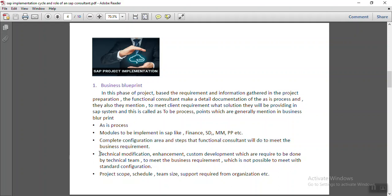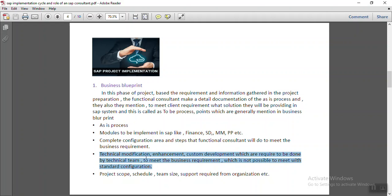The business blueprint also mentions what technical modifications, enhancements, and custom developments are required to be done by the technical team to meet business requirements. Although SAP comes with predefined best practices, every organization requires around 20 to 30% customization to meet their specific business requirements, and that is done by the technical team. This is also documented by the functional consultant in the business blueprint document.